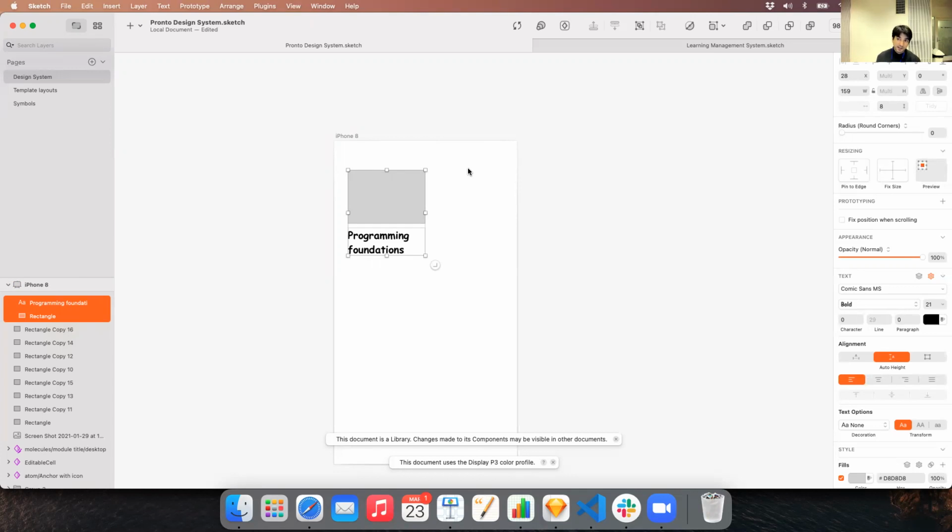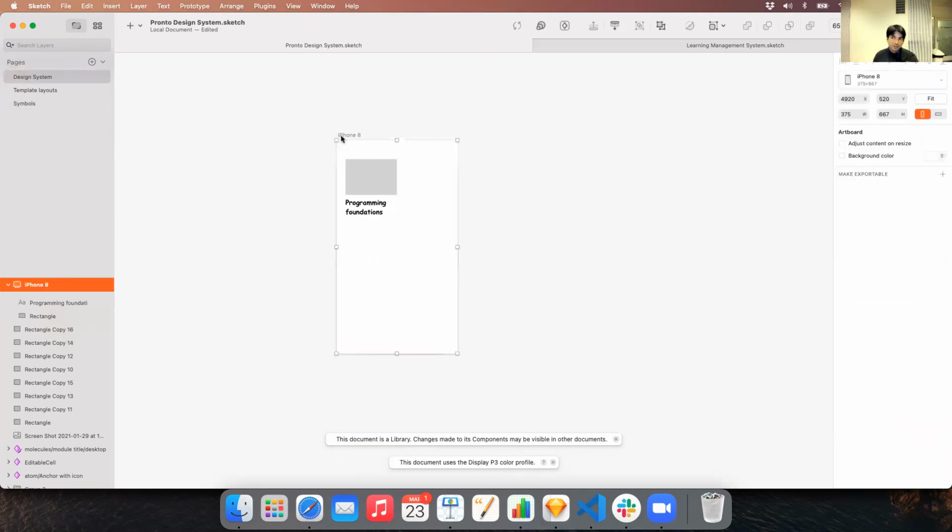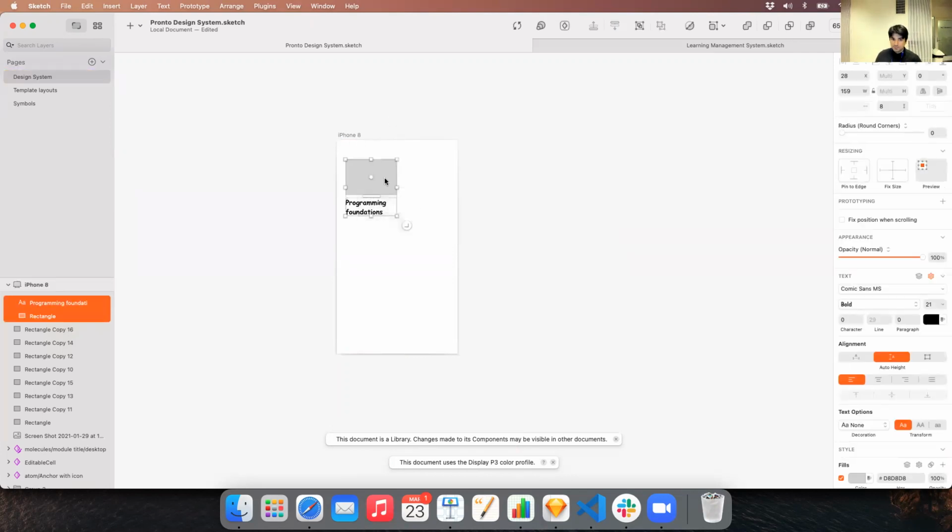In an agile environment, the client, the managers, the designers, and the developers collaborate and try to make a quick and dirty prototype. And everybody has an opinion to reach this first. And this is your first sprint, by the way. Your first sprint is to create this interactive prototype.